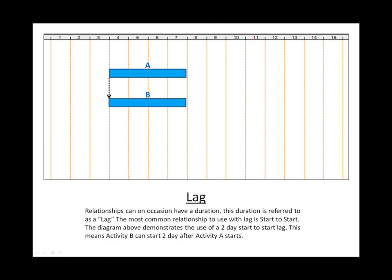One last quick thing about relationships before we get into the actual calculation part is lag. Relationships can on occasion have duration. This duration is referred to as lag. The diagram above demonstrates the use of a two day start to start lag. This means that activity B can start two days after activity A starts.